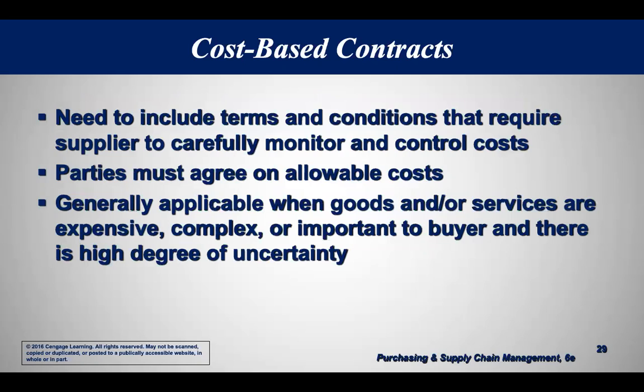What's an allowable cost? I'm not going to pay you for the gas it takes you to go and pick up your kids from school while you're making this desk for me, because that cost isn't allowable. I'm not going to allow that. That's got nothing to do with my desk. The supplier said, well, hold it. If I can't work all day on the desk, I have to go pick up my kids from school. So if you want me to keep working on the desk all day, you're going to have to pay me those costs. No, sorry. So you come to an agreement on what the allowable costs are.